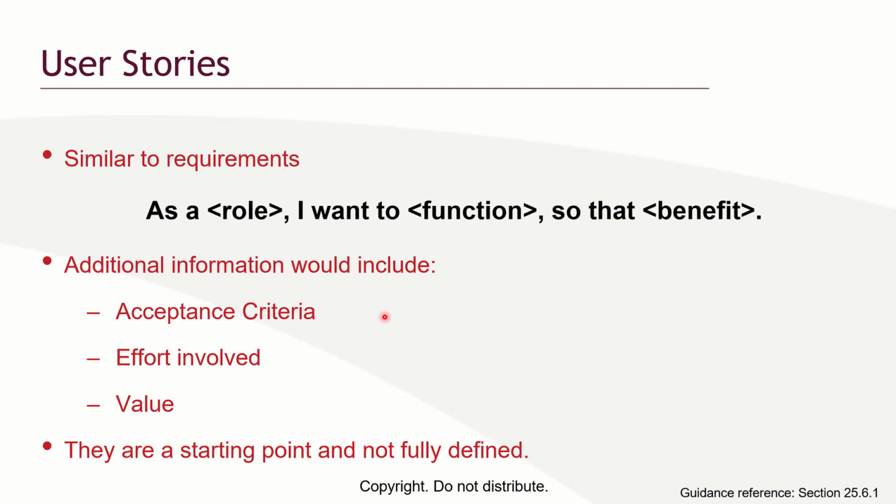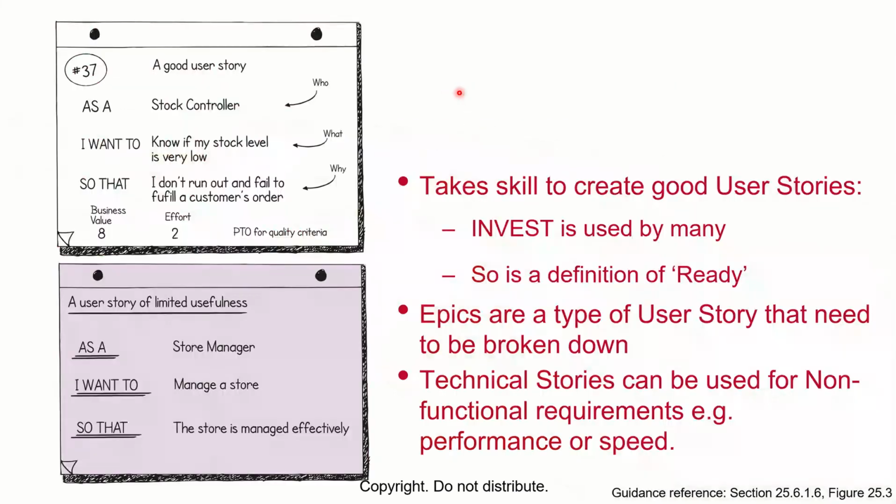How long will it take to achieve the user story? Okay? And then you can put a value to it in terms of a cost. What is the costing in terms of man hours? This is how much it costs to achieve it. The user story is always a starting point, and many times it can be refined. That's why we say it is not fully defined. It can always be refined. But what you need to know is this is the way to specify a user story: roles, function, and benefits. And that's the same for all agile.